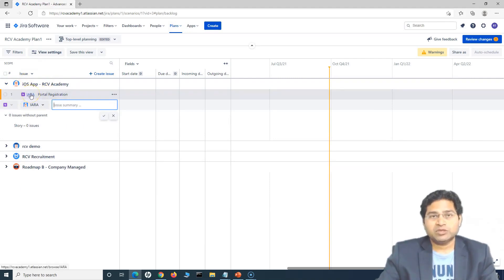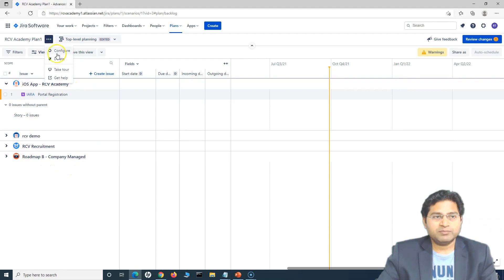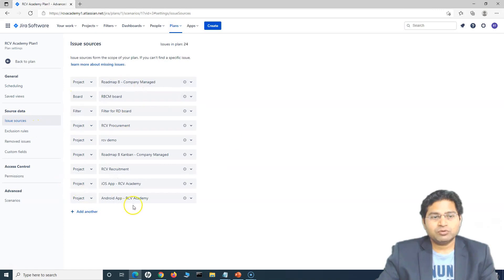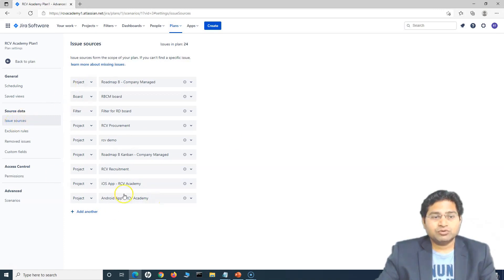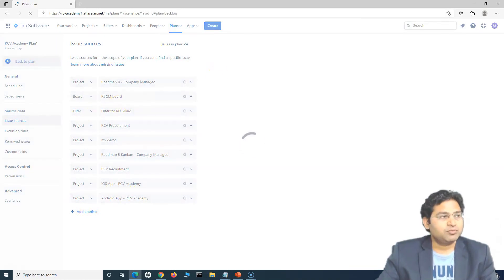As soon as there is an issue within the project, you will see that project listed here as well. To make sure that these projects are selected, I basically went to configure and issue sources. You have to make sure whichever project you want to plan in the Jira advanced roadmap is added under issue sources. So let's go back to the plan and add some more items.